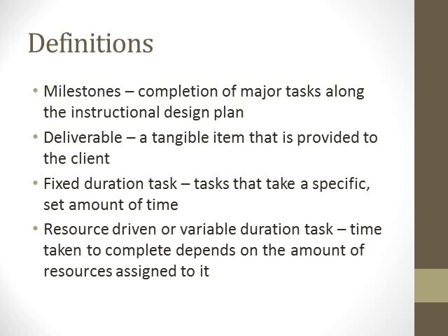And then you have two different types of task. You have a fixed duration task and a resource-driven or variable duration task. And when you start making your schedules or planning out your milestones to manage the project, you need to determine what type of task it is. A fixed duration task is a task that's going to take a specific set amount of time no matter what happens.